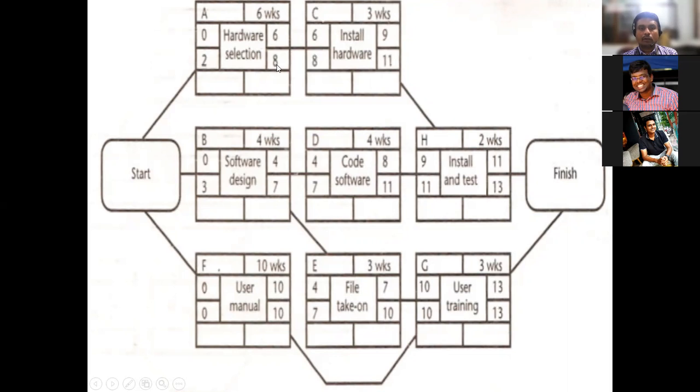Here 8 minus 6 is going to be 2. So we can start later, in the 2nd week instead of at the beginning; that is the provision given. Okay.